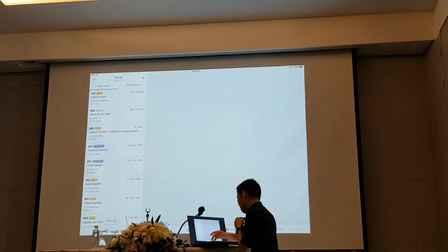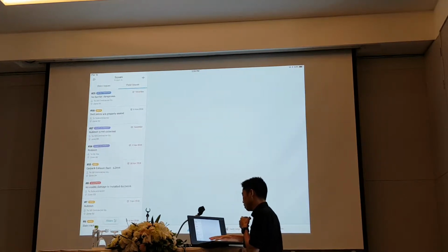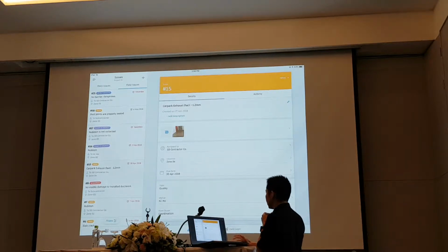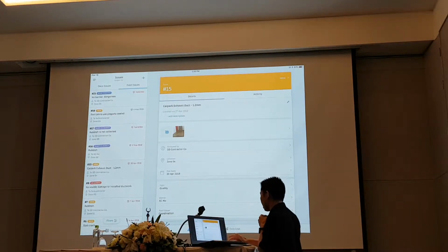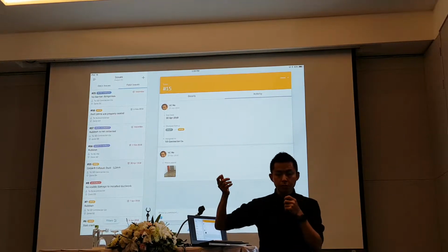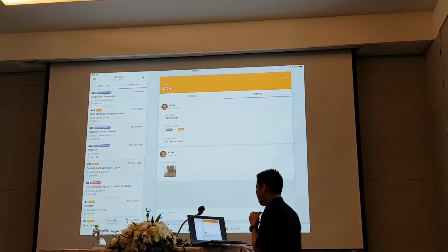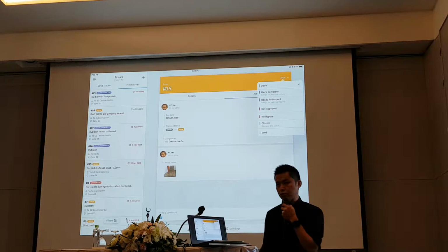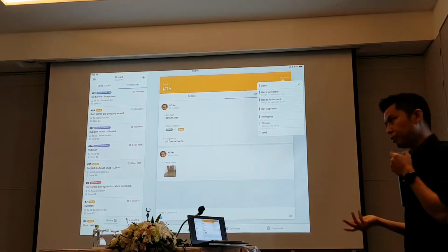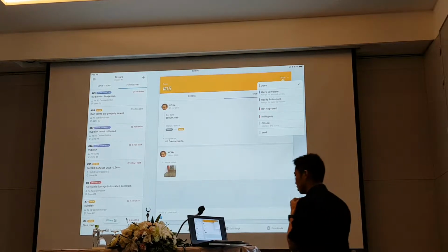Alright, so basically I can just quickly go to the field issue here. Alright, and I can say that, hey, there's one exhaust issue that's open, assigned to the SD contractor, there's photos, everything, and there's an activity over here. Now I can go in and comment, put in the photos, put in my comments, and I rectify the work. By the time I rectify that, I can change the status to work completed, ready to inspect, in dispute, closed, approved, or void. So it depends on whatever the status is.